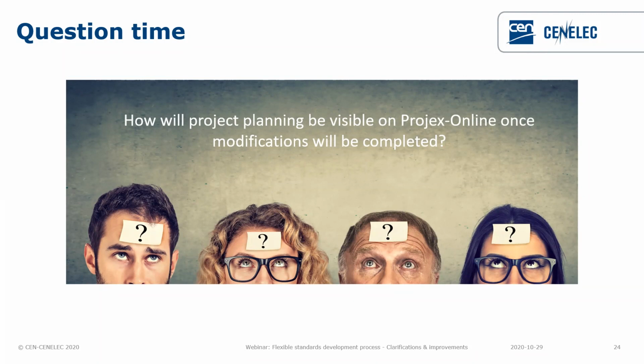So once we have implemented the solutions that we have presented. 14% replied that the column initial plan will always present the final deadlines to be eventually met. 73% replied correctly: the column adjusted plan will be the column that will always reflect the latest status of the project. And 14% unfortunately replied that information will have to be retrieved both in columns initial plan and adjusted plan.